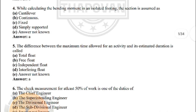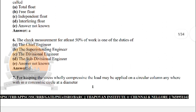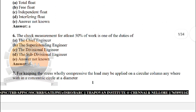Next: the difference between the maximum time allowed for an activity and its estimated duration is called — the correct answer is option A: total float. Next: check measurement for at least 50 percentage of work is one of the duties of — the correct answer is option D: the subdivision engineer.